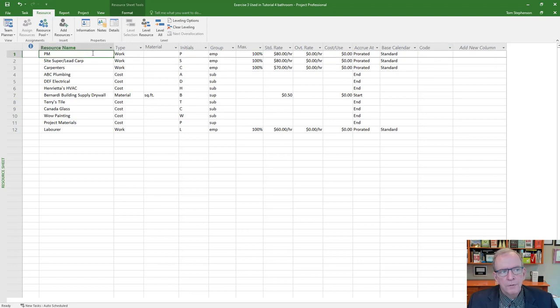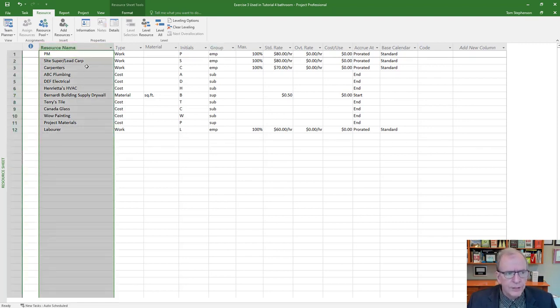So, for example, if your project manager is taking 2 weeks off in November and your project started in September, then it wouldn't schedule that PM or count the time that they're away. So you can do that. You can get really detailed in what you want to do, or not so detailed. If you just want to fill this out, that's as far as you need to go if you only want to monitor for resources. So know that there's 3 types of resources.